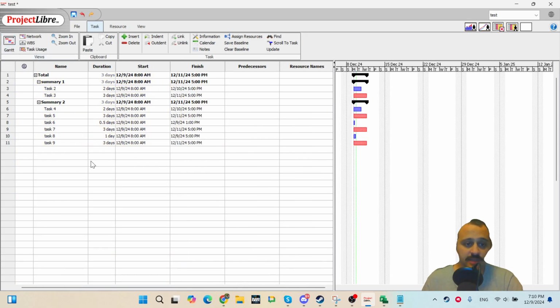It's not the same at all. 1 e-day is not equal to 3 working days. It's totally different. 1 e-day means 24 hours continuous without a stop.